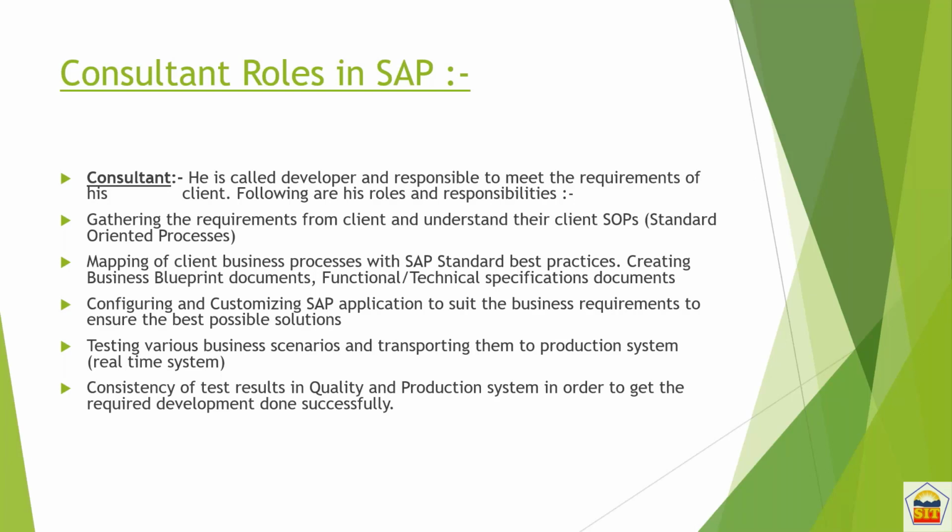and it should be signed by the IT team head or project manager, because down the line, if any changes are coming from the client side, and these changes are with respect to the design of that particular process, we can't make the changes. But yes, within that design, if we need to make changes, we will be able to do so. But if the whole design is to be changed, that is something which I would say is out of scope.